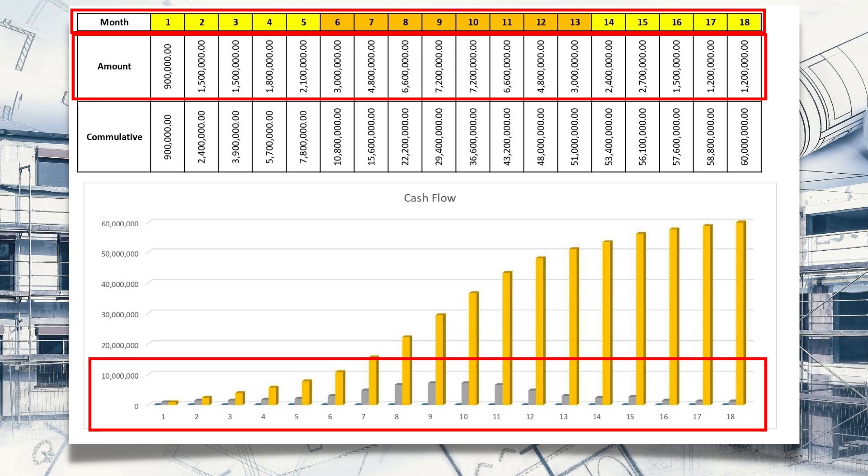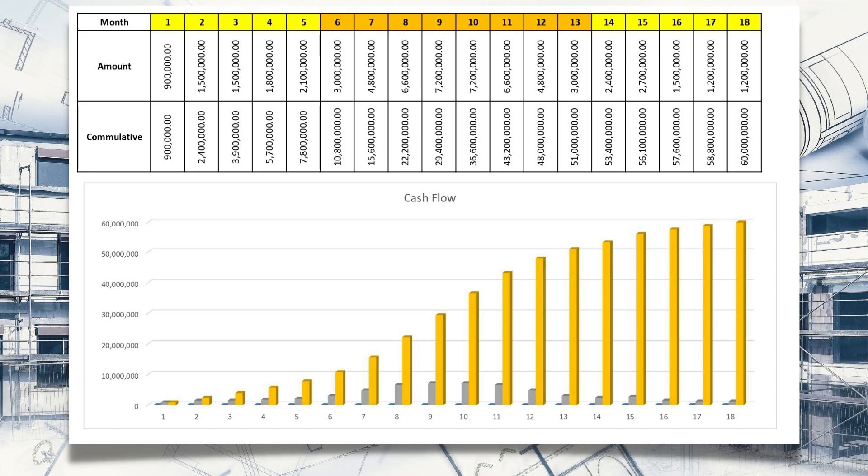The monthly amounts increase to a peak around months nine and ten where the most spending occurs, then decrease — so it looks like a bell shape. This is similar to the manpower histogram, which you get when you load resources on the program. The relationship between month and amount gives a bell shape, but the relationship between month and cumulative gives the S-curve.